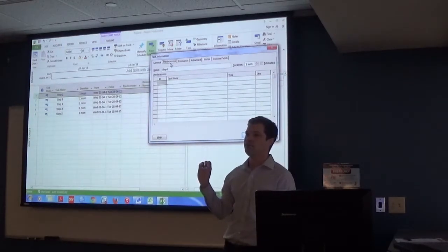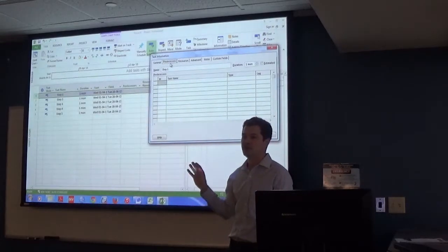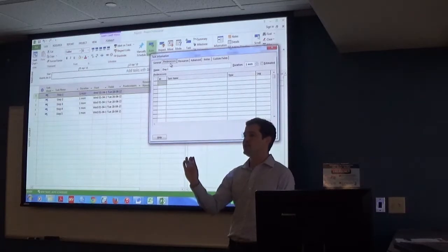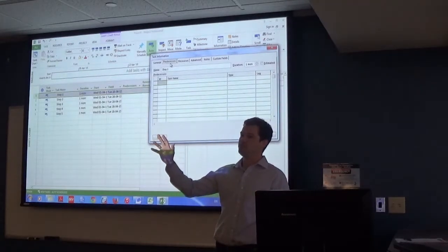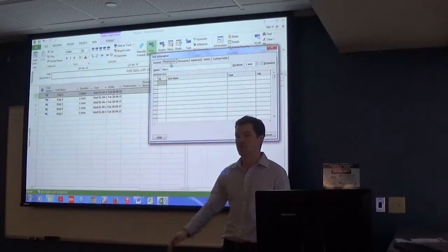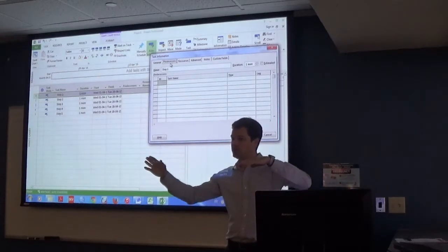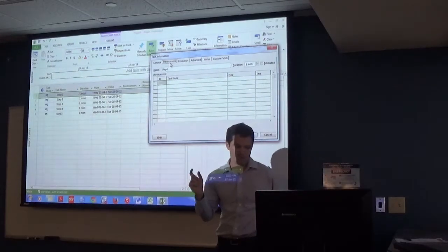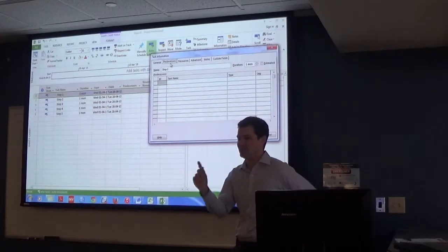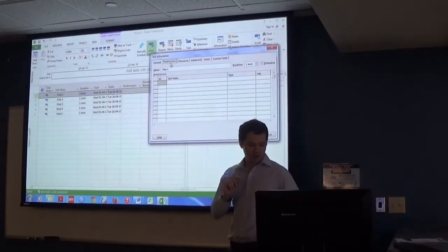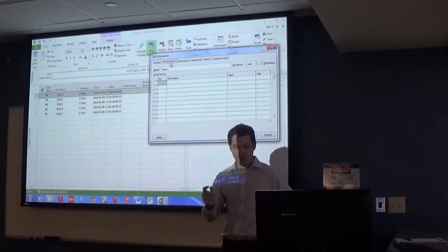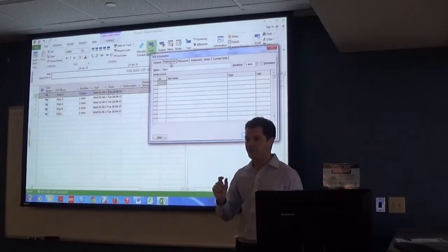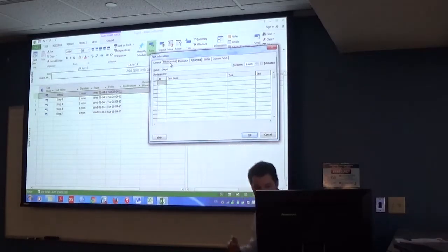So we might be doing the drywall while we're putting in the windows of the house, right? But the windows are going to take longer than the drywall. But let's say we were delayed on the drywall. That means we're not going to be able to put the fixtures in by a specific amount of time. So it's basically going to kick that out, and it will create a longer schedule because that's something that absolutely has to be done. So that's just a short description. It gets a little more complicated than that, but what we are defining here are the predecessors: the things that happen before that item is able to take place.